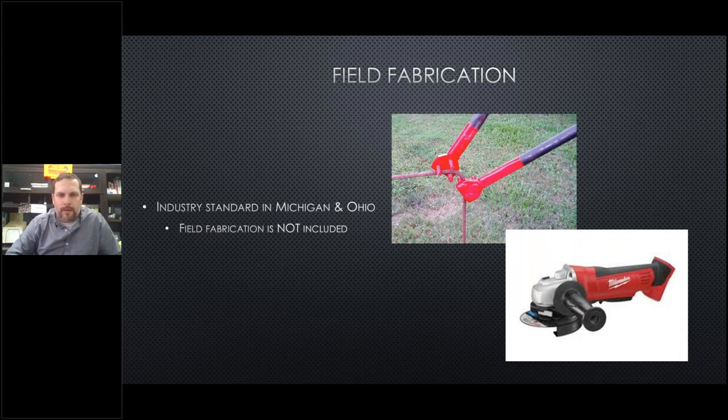Another thing we've been dealing with is relaying the importance of the fabricated tables in the drawings. As an installer, we use the bar marks and the bar charts daily to figure out what we're installing. What we've experienced with some of the fiberglass is that they're using total inches, so a 20-foot bar would not come out labeled as a 20-foot bar. It would come out in inches, and we had to have our guys use calculators and do some math to figure out what bars are what. But that's one thing we've been trying to streamline, specifically with Owens Corning, making sure that the tags on the bundles relate to what is being called out in the drawings.